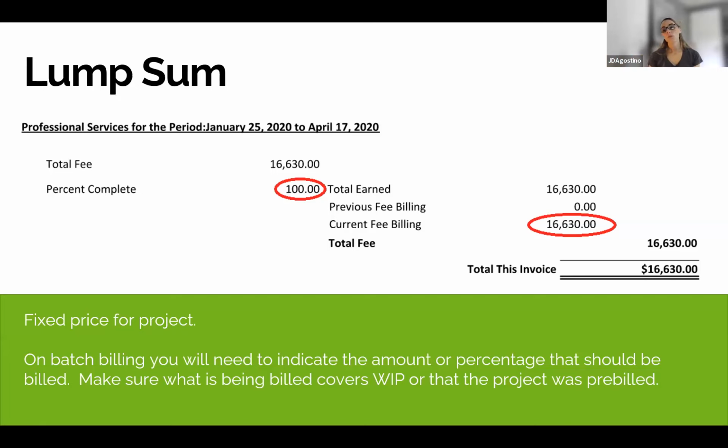So keep those things in mind, and make sure that the fee covers everything that you're spending on the project. If it does, great. If it doesn't, then know whether you went over because you did some additional work, and if you did additional work, maybe that's cause for putting together a supplemental, as Sue mentioned. So keep track of those costs.